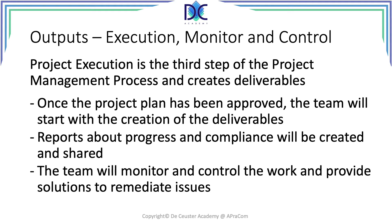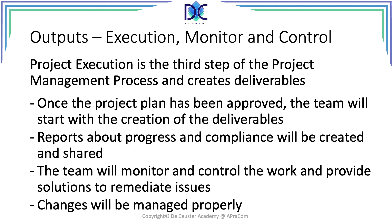We may have changes and encounter additional risks — there are a lot of things we may encounter that we have to resolve. Changes have to be managed according to a predefined process; they cannot just be implemented like that. Changes have to be evaluated and presented to the change control board. Once the change control board accepts a change, it will become part of the project, be integrated in the project management plan, and we will create new baselines.